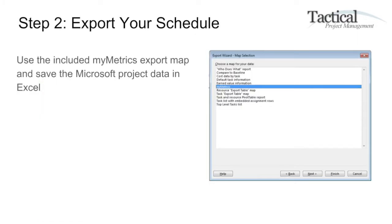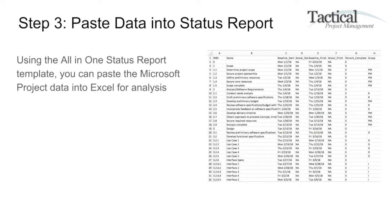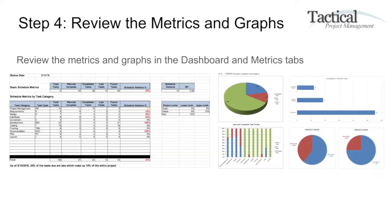The next step is simply to export your project schedule. You use the My Metrics export map that's included and save the Microsoft Project data into Excel. Then, using the all-in-one status report template, you paste the Microsoft Project data into Excel for analysis. Within seconds, you're able to review the metrics and graphs in the dashboards and metrics tabs.